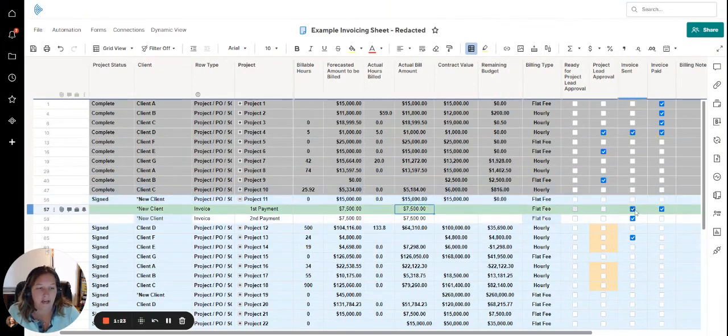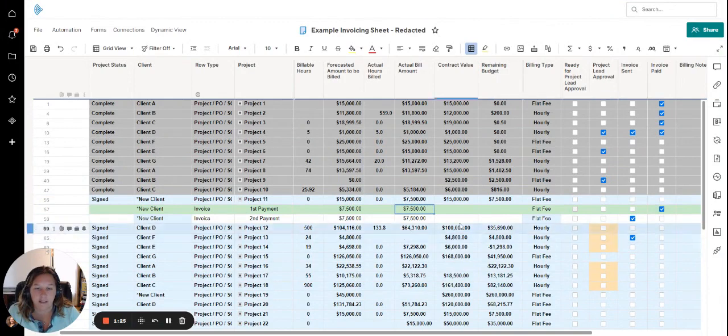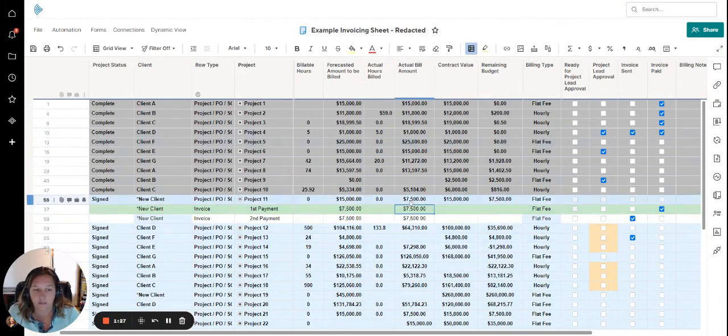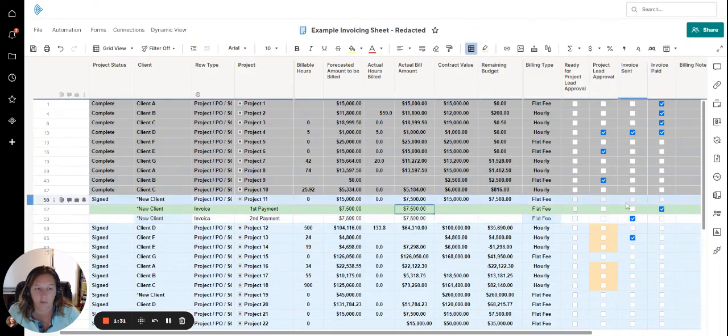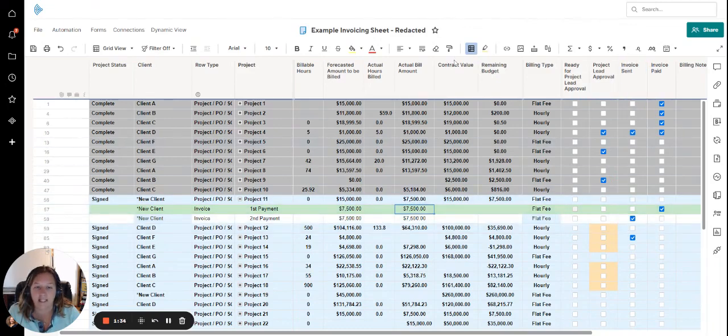But let's say I remove this invoice sent. Now the actual build amount is only showing the amount of the items where the invoice is sent. So that's what I'm doing.